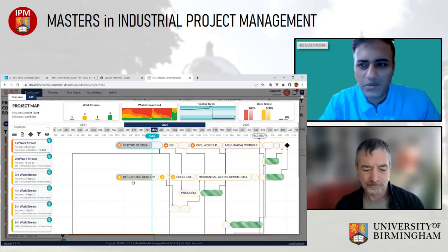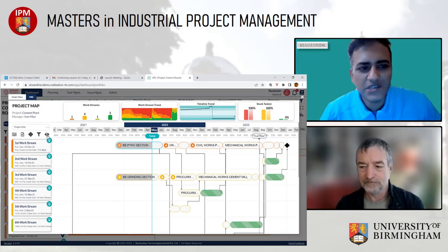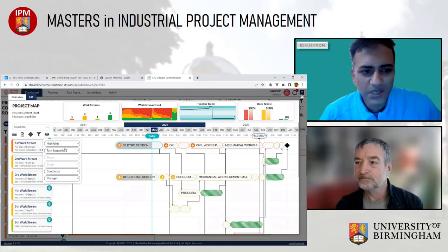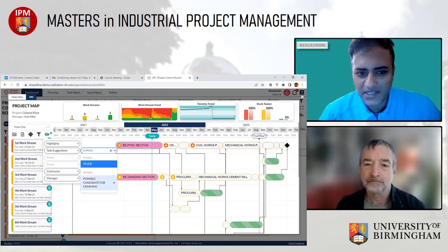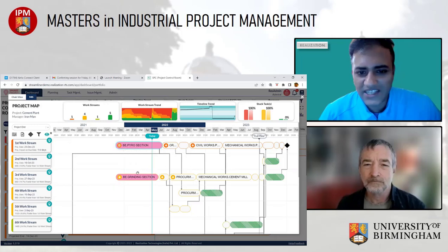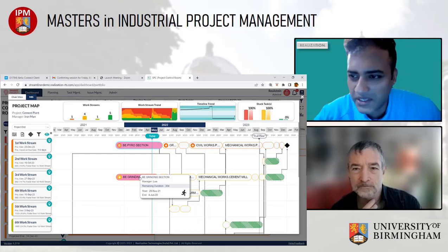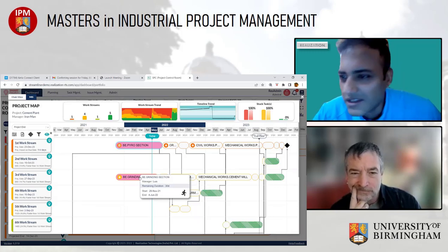That's the only way for me to know whether focus and finish is happening or not. And so the system provides you ways to test and see whether that is happening. So we can decide to highlight. The system is continuously measuring the pace of the task, and I can ask the system to highlight if anything is stuck. And I can see that these two are stuck, which should ring the alarm bells for me: if I am doing focus and finish, how come my two most important tasks are stuck? They're not moving. They are the ones that should be moving.